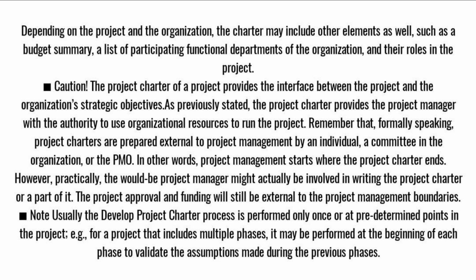Note: usually the develop project charter process is performed only once or at predetermined points in the project. For example, for a project that includes multiple phases, it may be performed at the beginning of each phase to validate the assumptions made during the previous phases.